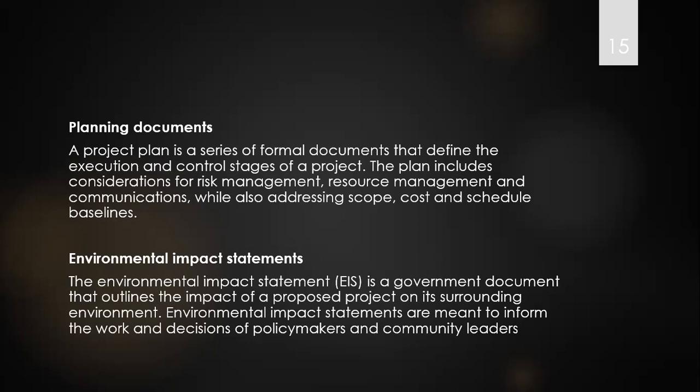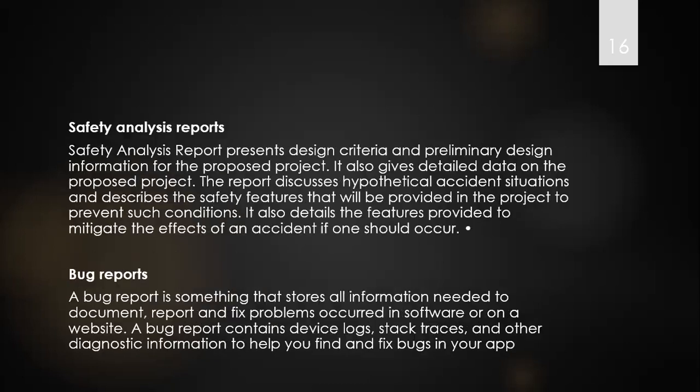This is in Sri Lanka. This is issued by the Central Environmental Authority. If you are building, let's say, a private power plant, you will have to go to the Central Environmental Authority and get an environmental impact assessment statement where it tells you how good your project and how bad your project will be to the surrounding environment.